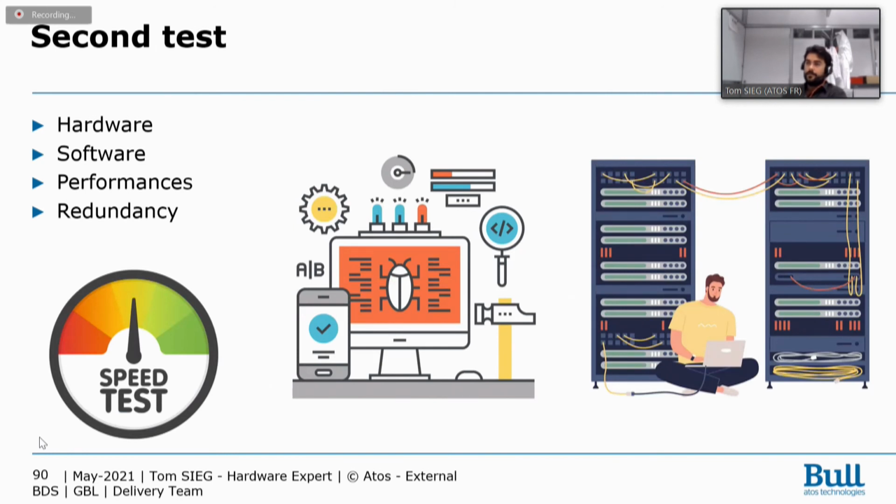It's also the moment to check your monitoring, if you will be able to see the power consumption increase, water consumption increase, water temperature increase, etc. And it's a moment to check your software, if your software stack is correctly installed, if all the components are in place, and if all is working properly.